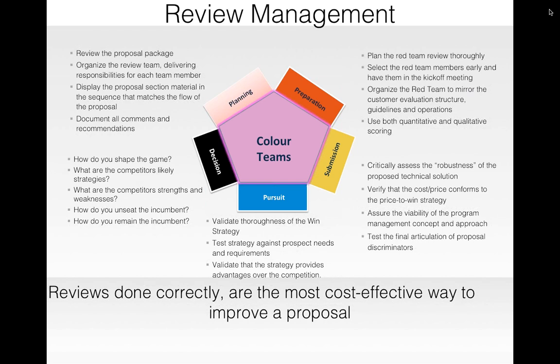Again, the suggestions coming out of each of the review meetings should be propagated back to the team, not only with the suggestion but the reason and the logic behind that suggestion, and what needs to be done to implement that suggestion. So with every review meeting, you will be having a set of outcomes which has to be delivered to your internal proposal development team, so that they are in line with the reviewers' thoughts and comments. So this is basically the review management.